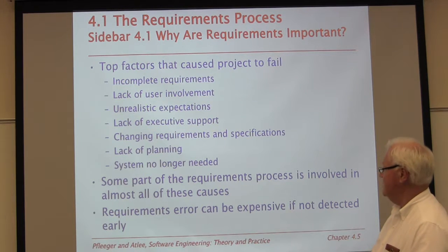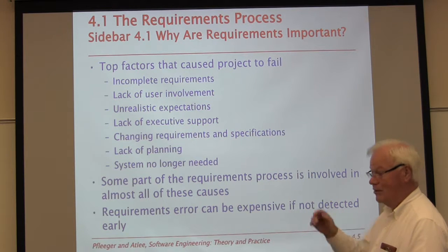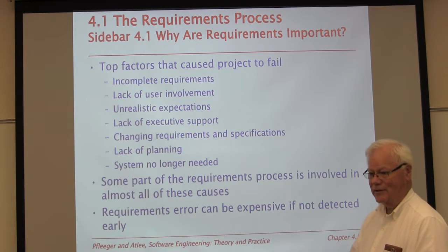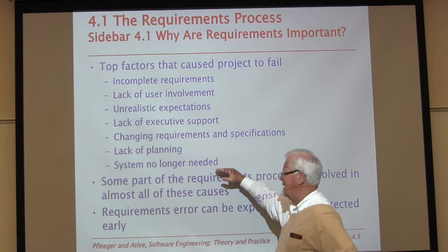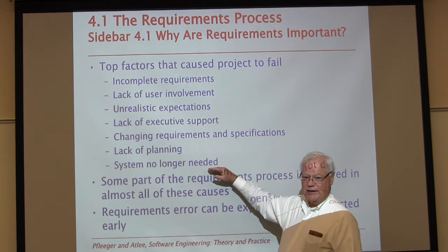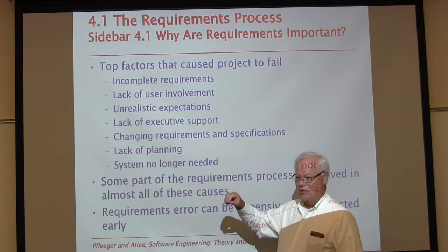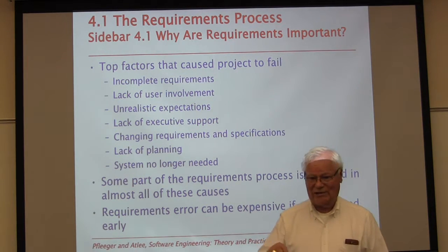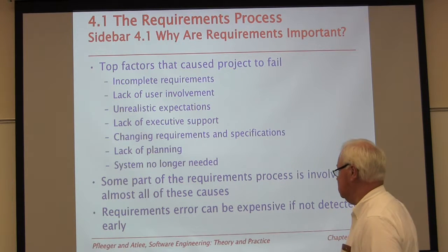Changing requirements and specifications. That's kind of obvious. You don't want them changing after you've collected requirements and gone into planning. And what if you didn't do the planning and just start coding? And what if you get so far into it, you're well behind schedule? This is what really hurts us. You get behind schedule and the executives come down and say, hey, you know, we don't need that system anymore. So time to market is very similar to any merchandising type of thing. It's the same thing with programming. If you drag it on too long, somebody's going to say, we're not hot for that anymore. Okay.